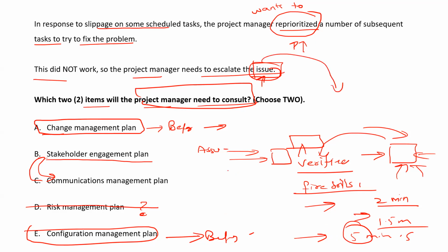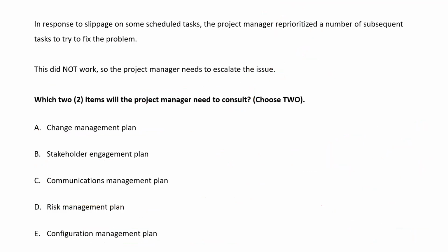Because it has occurred. Until you just checked it on a theory basis, you try to prevent it. On real data, we try to correct it. After an issue, you will take corrective action. Before an issue, you will take preventive action. Correct. Perfect. So B and C were the correct answers.